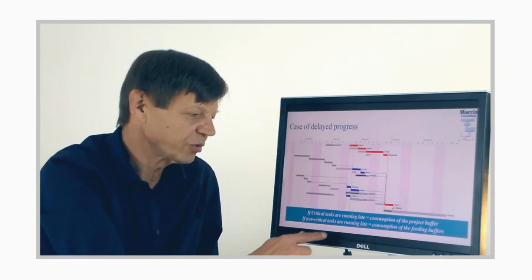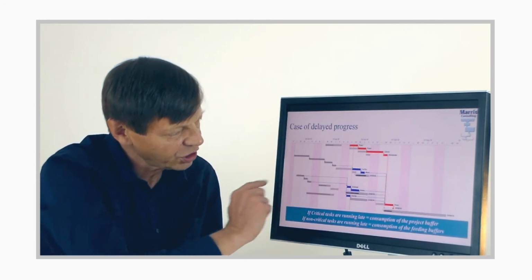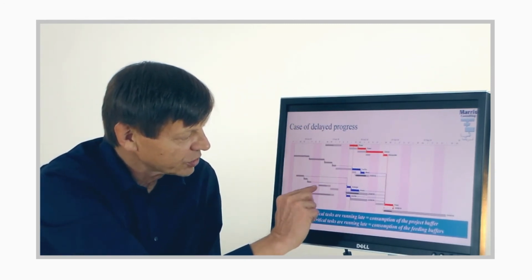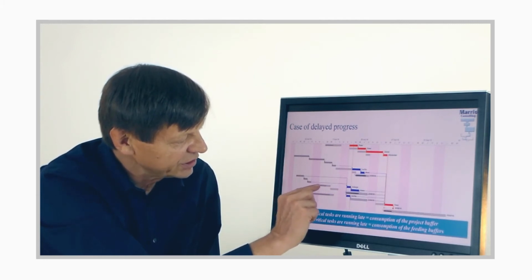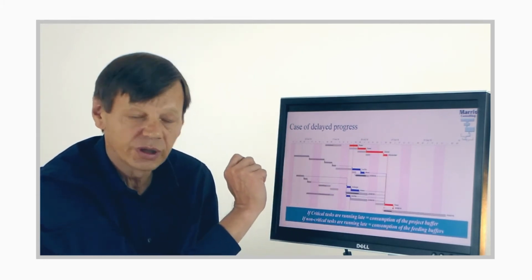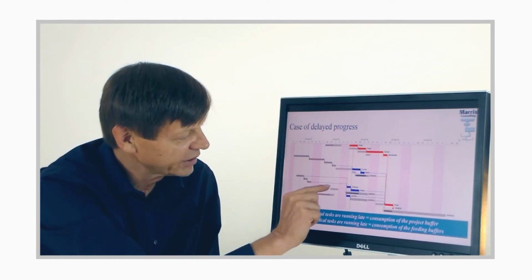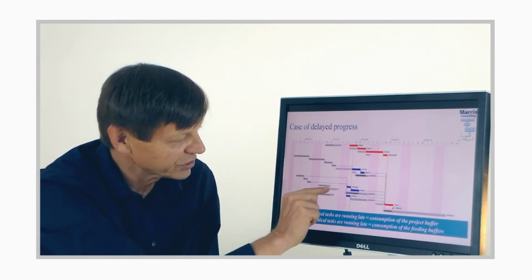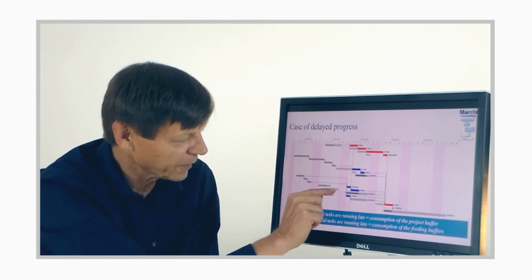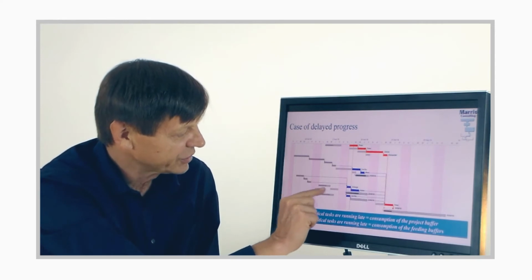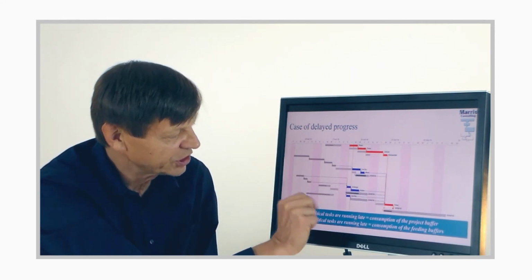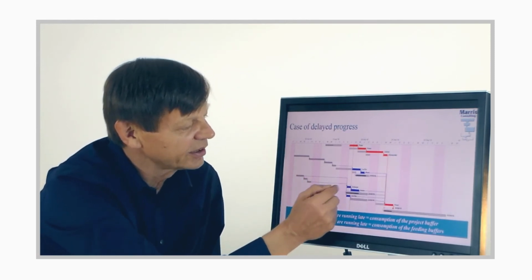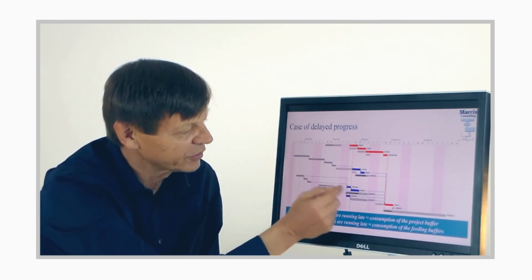If we look at another part of the project here, we had a whole bunch of tasks that needed to be done that were non-critical. Solange was meant to do this task here, and she hasn't quite finished. She's still got a day of work to do. Because she hasn't finished that task, Adam, who had to take on the next task, couldn't start, so he's completely overdue. And Cecilia, that was doing something else, is nearly finished, but she's still got 1 day of work to do. So what hasn't been done yet needs to be done, and so we put that back into the future.